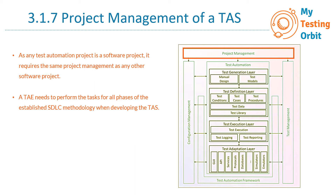The methodology used depends on your project — it can be any. If you are using Jira, you can use Kanban or Scrum. Whatever methodology you are using, you can use the same methodology for the test automation solution as well. You can have a separate project for your test automation solution in Jira, with multiple sprints, and all new requirements that you need to work on can go into the backlog. Basically, you are running a separate project for the test automation solution.